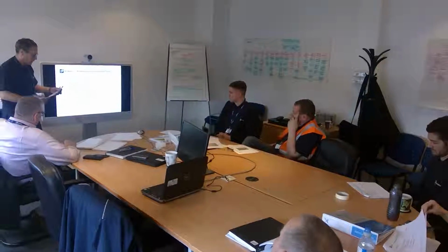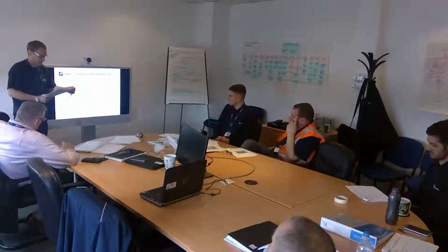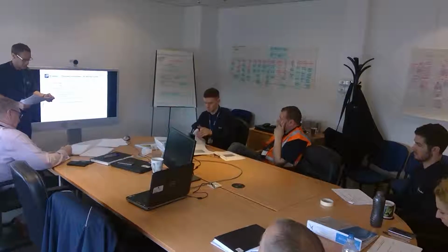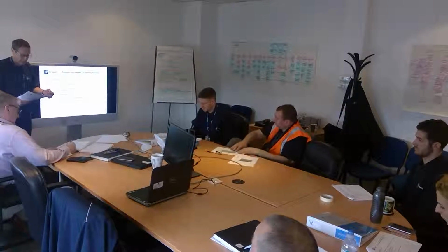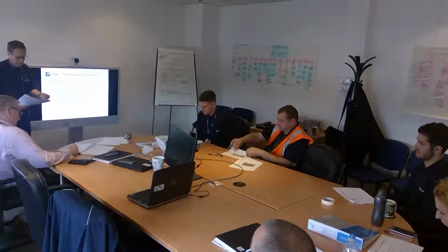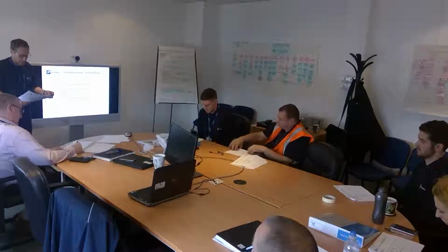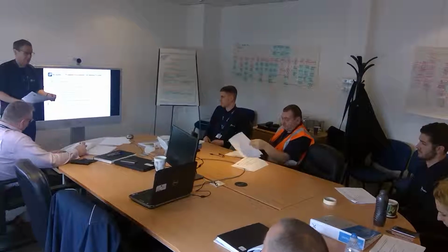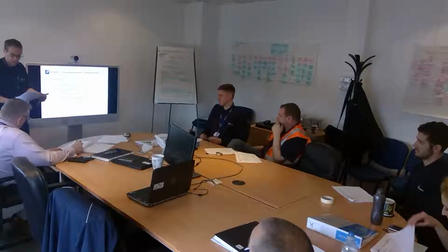Right, daily morning briefings already occur to some extent, but what we want to do is introduce them as a more structured event. So in every daily morning briefing, we'll start with safety at the top of the agenda, as it should be. Then a job by job progress update, looking at issues affecting any production that we've got at the moment, materials, where we are on the programme, are we on track, are we behind, are we in front, and then any other business which might be about client visits, any special requirements.